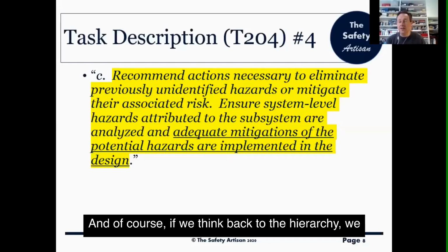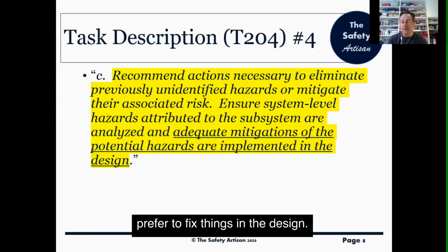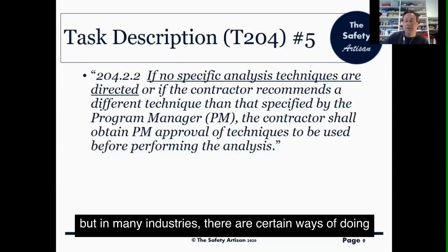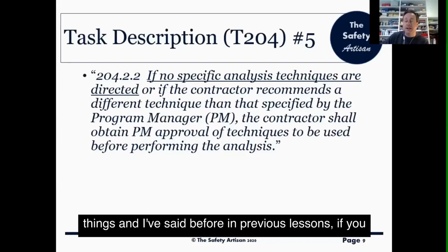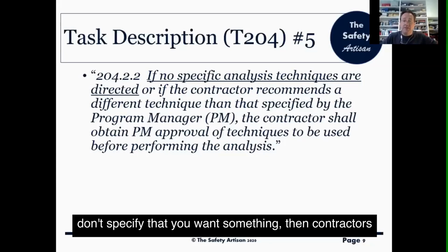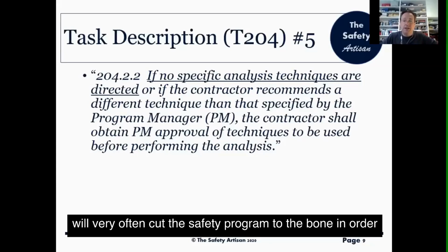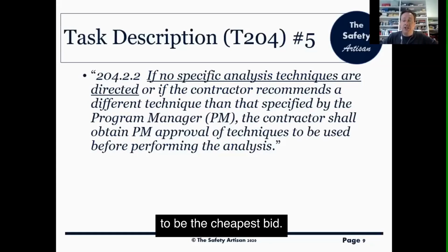And of course, if we think back to the hierarchy, we prefer to fix things in the design, and we should pretty much assume that we have to do this. But in many industries, there are certain ways of doing things. And I've said before in previous lessons, if you don't specify that you want something, then contractors will very often cut the safety program to the bone in order to be the cheapest bid.